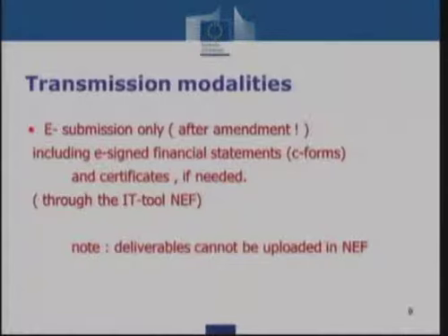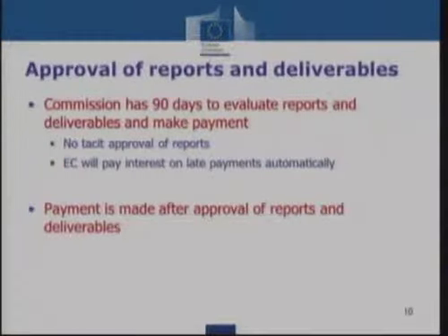Then also the date has to be fixed together with you, and this has to be in line with this 60 days. You have to finalize your reports, but this should also allow us to make the payment within the 90 days. We do know that with periods like summer, July, August, with Christmas periods, sometimes there are evaluation periods, or you are preparing another proposal.